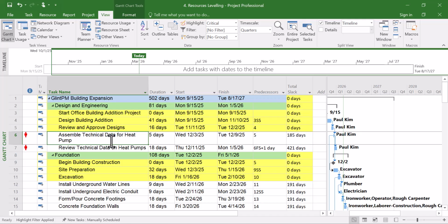You're going to be the one adjusting this manually in order to preserve your critical path, because you don't want anything to change. The implication of your critical path changing is that the activities or the project completion is going to be delayed, because usually when the software adjusts all the resources for you, you're going to increase maybe the hours available for the resources to work. So that is simply what it means.